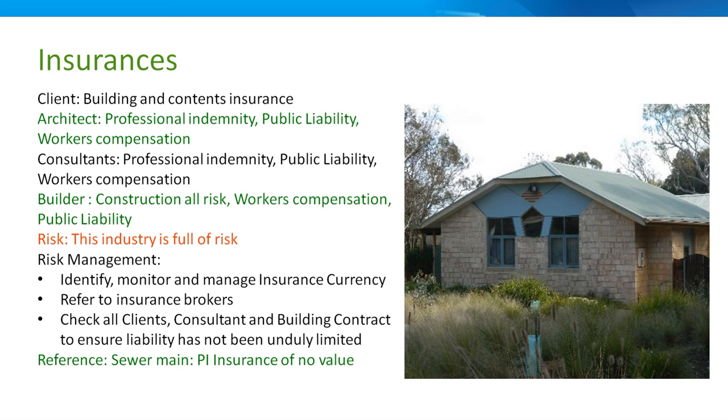So it cost me $13,000 in letters, and then I was told if I spent $70K and engaged the Queen's Counsel, I'd get about $160 back. But I had to spend 70 plus the 13. So do the sums, and it would take 2 years. So after a while, I said, we'll leave it. So the professional indemnity insurance was of no value because no one was suing me. You might have another way of approaching it, but at the time, we had to get the job done. So we ended up doing a year's work on that project for free.